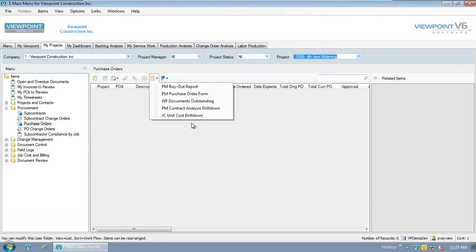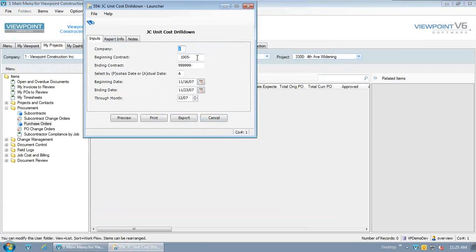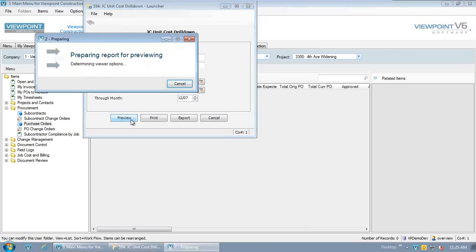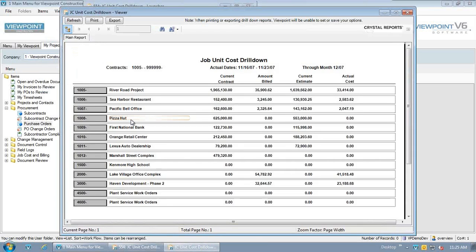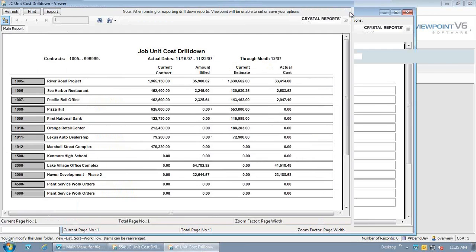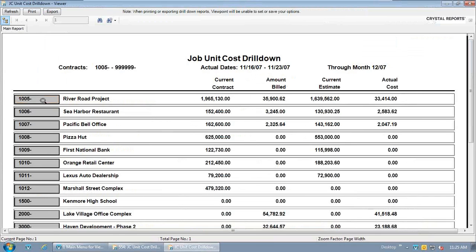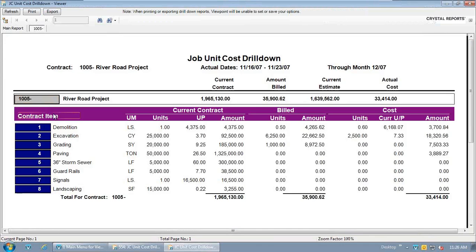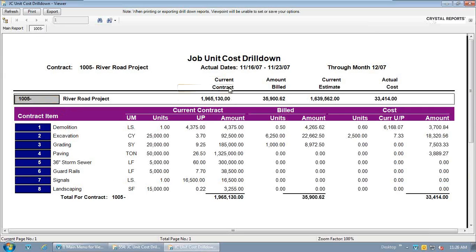Some of the other key tools in here, one example cost report, we call it the unit cost drill down. The great thing about this report is as you're managing the project, I can run this report for a specific period of time. So if I just wanted to look at actual dates, look at one week's worth of information, I can go ahead and do that. So if I take a look at one of my projects out here, as I drill into it, I'm going to start seeing each pay item. And then I'm going to see a further breakdown of what our agreement was with the client, what we've billed the client to date, what our job cost, what our estimate was coming from Hard Dollar, and then what our actual spend has been.